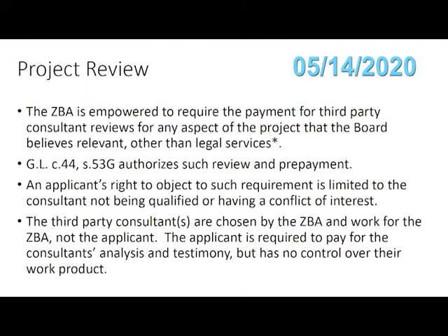And because of that, my advice to boards is to be conservative up front. Let's say we want 5 experts that we've identified we need support on. And those 5 experts run the gamut of the skill set. We're going to ask for $10,000 per expert, $50,000. All excess money that's not spent gets returned to the applicant by statute. And if we need more money for one particular expert, we'll ask for more money later on. So I wouldn't ask for more than you know you're going to need to spend from the beginning. I'd be conservative, but no, there is no statutory limit on what you require. Just be reasonable, because that number is going to be used as part of the uneconomic calculation.